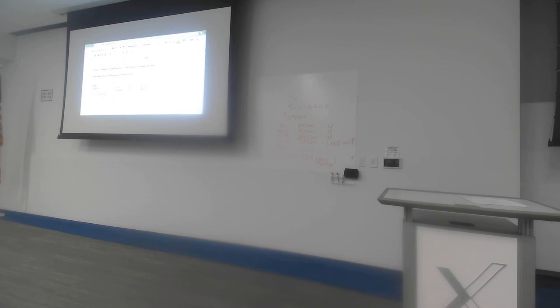The bonus or the opportunity cost: my client has offered me €8 for every day I bring this project in early. I want to balance off the cost of my activity versus the actual bonuses that I get on the other hand. So I'm going to put in minus 8 there. My overall cost, if I do this, will be 117 minus 8, which will be €109. What I'm trying to do is bring the overall total cost of my whole project as low as possible. That's when I know I've got the optimum schedule for my scenario.